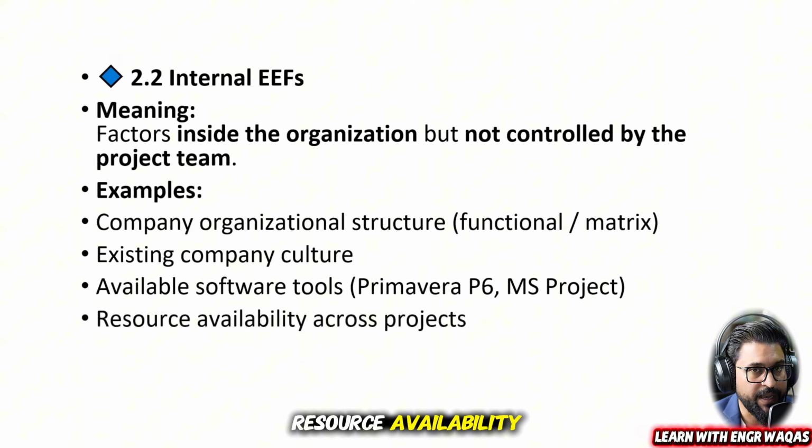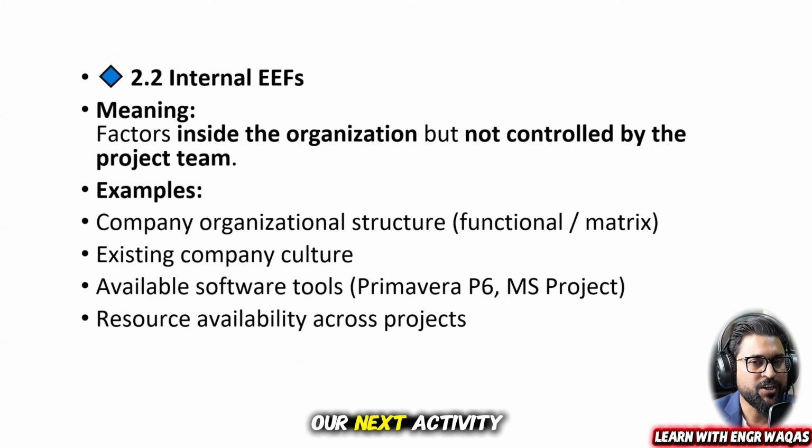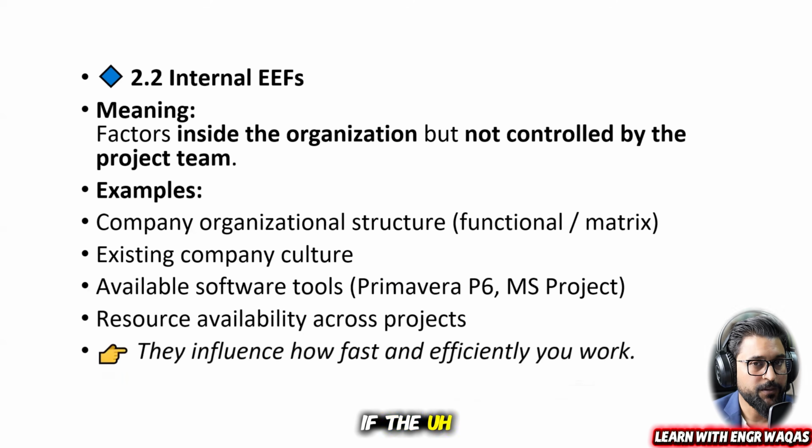Resource availability: in an organization with enough planning, if we are supposed to start our next activity in the next 10 days and we need cranes, and cranes are not available, of course it is going to impact or delay that activity if the concerning resources are not available. So they actually influence quickly.